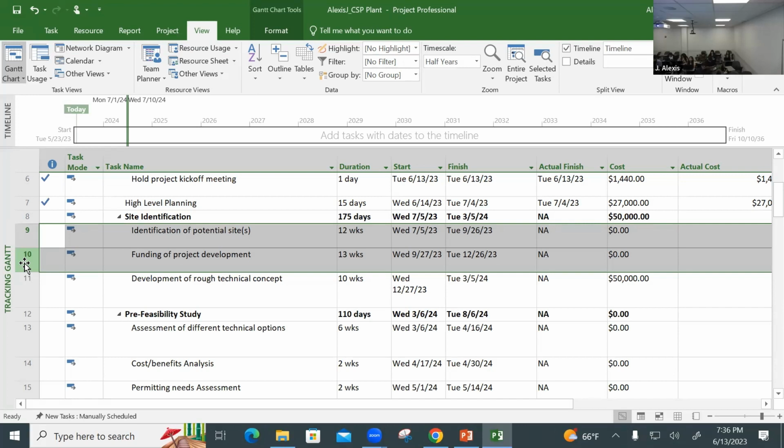Because if you set a baseline before any of this, anything you add after the baseline will not be part of the costs you're trying to control.